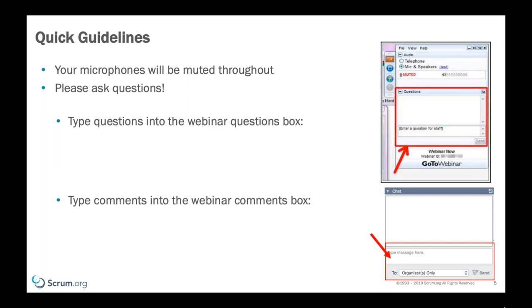Instead of, I know that at some point I'm going to have to pull those 200 tables from that accounting system so that I can do the year-end reports, I'm going to speak to accounting and say, what's the most important report you need? So instead of building all of the data model I need, and then building the entire import process and testing it, so I've got nothing of value for those accountants, I'm going to ask them, what's the most important report you need?